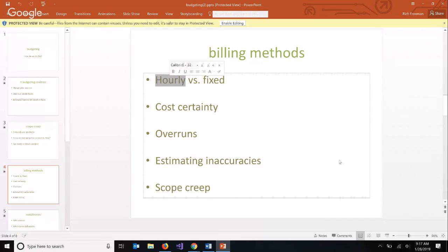I'll give you an estimate, but it's just an estimate. If it takes me less time, you pay less. Takes me more time, you pay more, but I'll always be fair. I will never charge you for time I didn't actually work. But that removes the risk for me. So eventually you may get in that spot if you have a good relationship with somebody and you trust each other. Then you could get to hourly, but most of the time you're going to have to quote a fixed price. We still budget, we figure out the cost based on the hours, but ultimately we're going to have to tell our customer, look, here's the bottom line, here's the total price for this. You want to go ahead, yes or no?